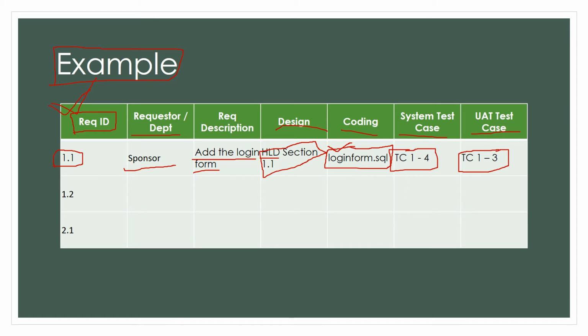So did you see how one requirement of adding a login form is traveling? It was suggested by the sponsor. The description was add the login form. It is mentioned in the high level design document section 1.1. LoginForm.sql is the coding module. And then finally, these are the test cases that the login form corresponds to. So this is the journey of the requirement, the login form.